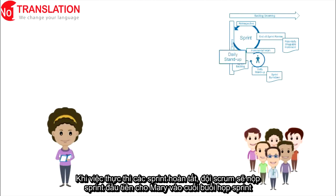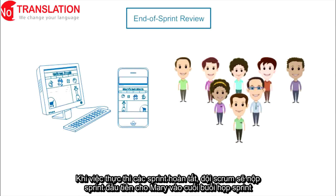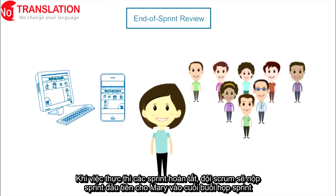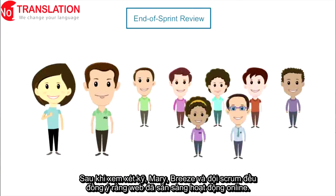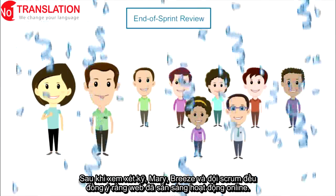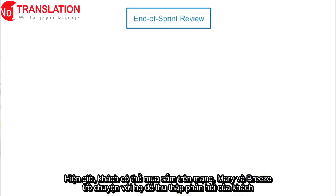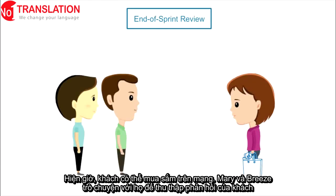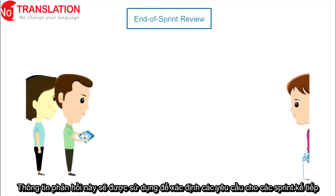When all the sprint's work has been completed, the Scrum team presents the first sprint's deliverables to Mary in the end of sprint review meeting. After reviewing everything, Mary, Rajesh, and the Scrum team all agree that the website is ready to go live. Mary's toy store is now online. Now that customers can shop on the internet, Mary and Rajesh talk to them in order to get feedback on their experiences. This information is used to identify new requirements for upcoming sprints.